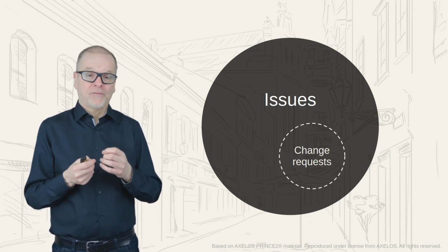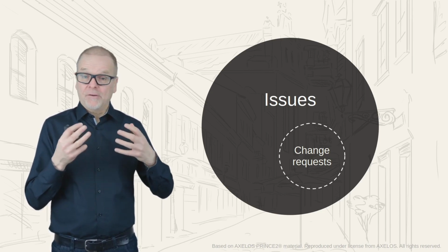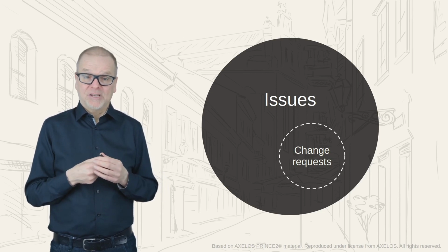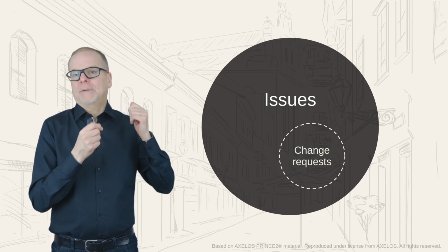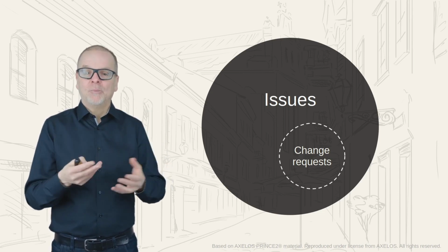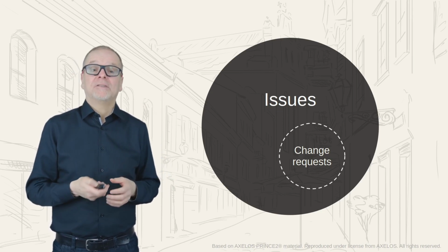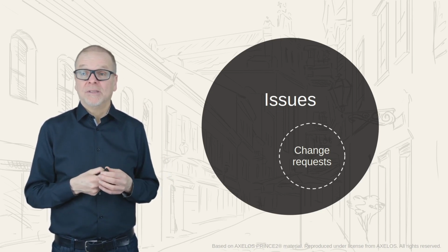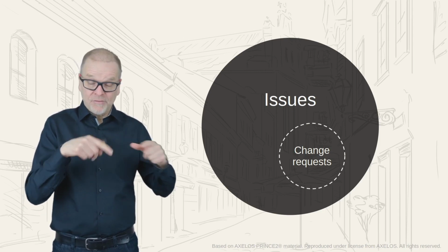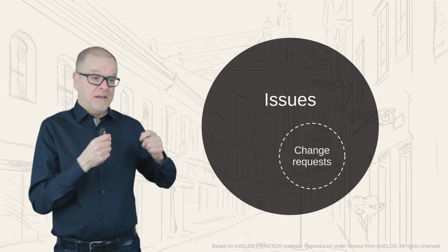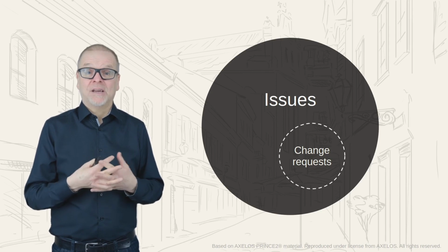What about an example for change requests? Well, requests for changes can appear at any time in a project. Sometimes change requests look easy. For example, I think we had before in a lesson, adding a new payment gateway. That sounds easy. And we may think on a first glance, oh, that could take two or three days to do that. But then later you find out, hey, this has an influence on lots of other areas of the application, such as the invoice system, and now it may take 4 weeks of extra time to fix.